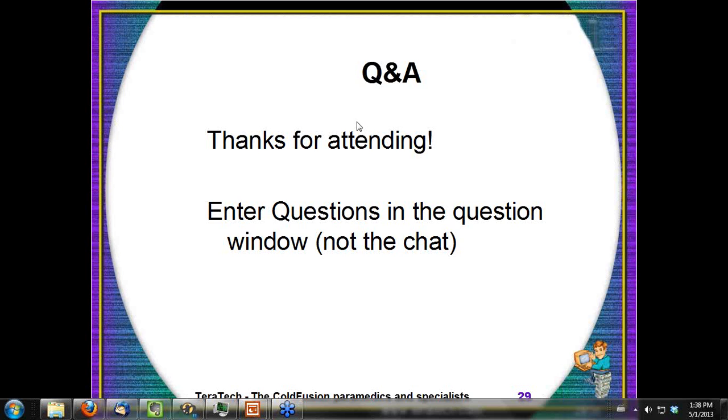I think the keys to doing accurate estimates are making sure that you have split up the tasks into things you understand clearly and that none of them estimate out more than a few days of time. If you've got a task that's going to be several weeks of time, see if you can split it up. And then having someone else review the estimate and look for missing tasks or things that aren't clear or perhaps things that are underestimated. And then also keeping track of your estimate against what actually happened in the project and then seeing which tasks you estimated accurately and which ones are underestimated, which ones are over, so you can improve your estimating skill.